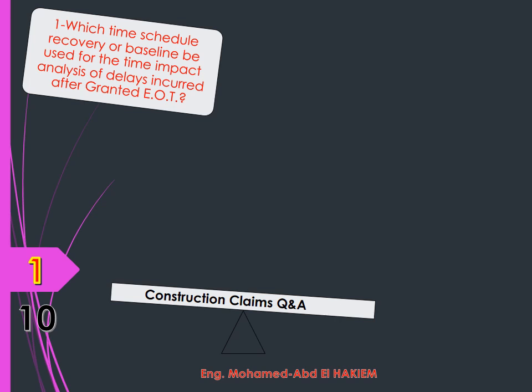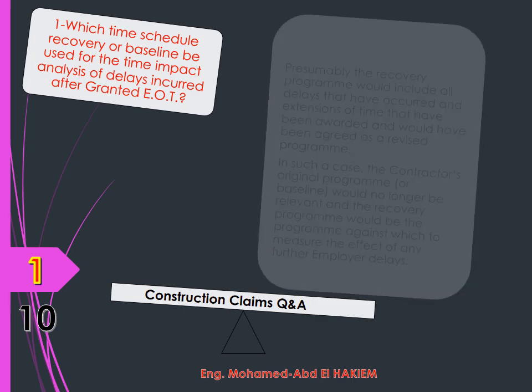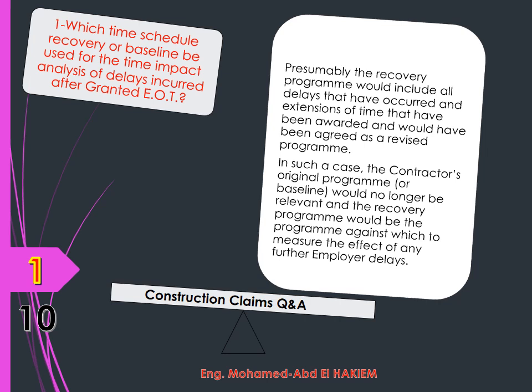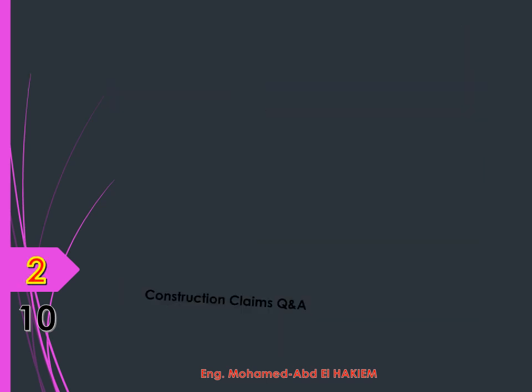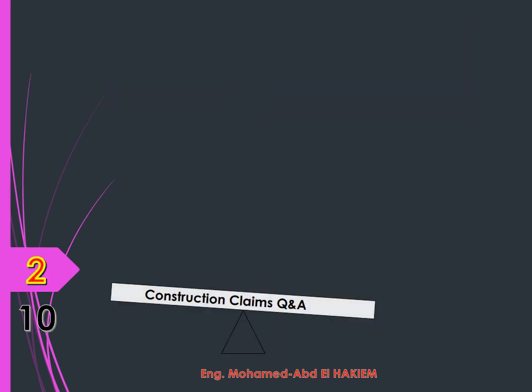If a recovery schedule is submitted by the contractor to recover the delay in the project for a particular data date, and after that data date there was a delay caused by the employer, the recovery program would include all delays that have occurred and extensions of time that have been awarded and agreed as a revised program. In such a case, the contractor's original baseline would no longer be relevant; the recovery program would be the program against which to measure the effect of any further employer delays.